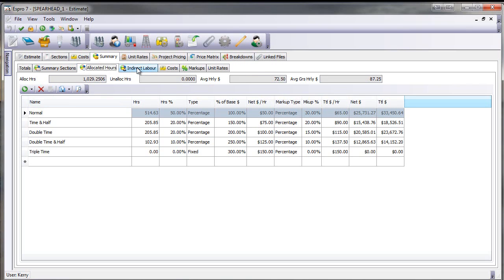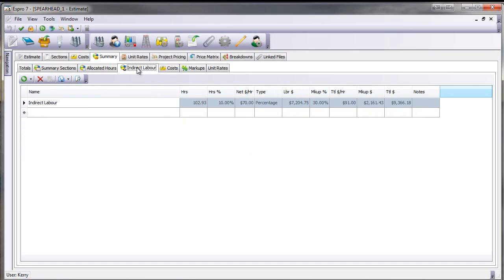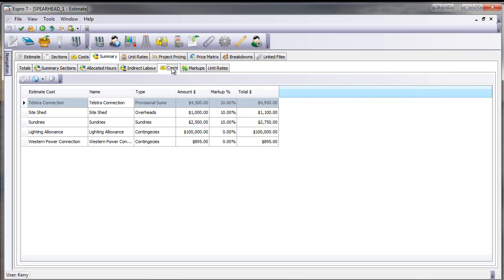One of the new features is our indirect labour, where I can now do an indirect labour of 10% of the job, which is now calculated 102 hours, and I can set the sell price for that. Here's my estimate costs, where I can now put mark-ups on if I want to.